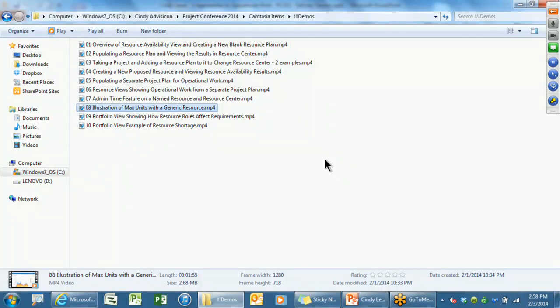What they did is they let their project managers do leveling at the enterprise level. However, that project manager could only control like 4 resources, so when they leveled their project, because they could not control any other project, it postponed their projects on average 1 year. So honestly, many customers on Project Online are not using the built-in leveling feature. They're doing it themselves with a portfolio view that I'm about to show you. So stay tuned.